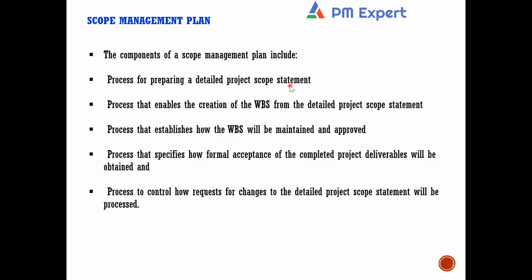It should talk about the format or the template you are going to use to create the scope statement, and till what level you are going to decompose the WBS. So everything related to scope management, all the processes, is defined in the scope management plan.